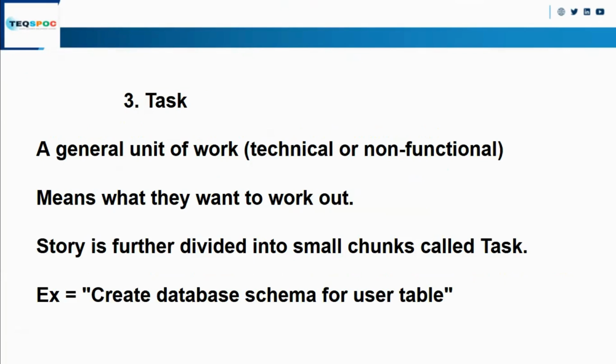So first, let me go through the task. What is that? A general unit of work, technical or non-technical, functional or non-functional, meaning what they want to work upon. Like, as a user, I want to create a save button so that I can save my credentials. So for saving a credential, what do you need? You have to create a form. You have to get the requirements. You have to create an API. So these are the tasks.